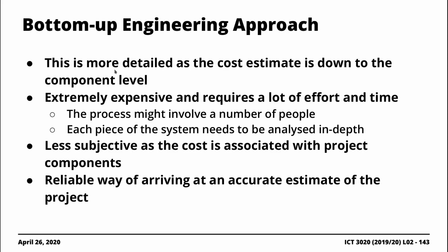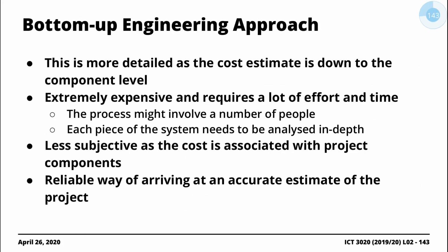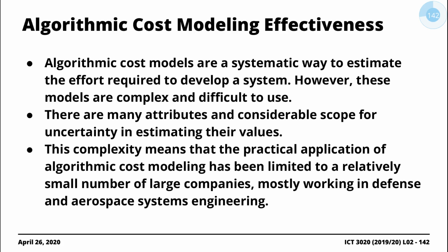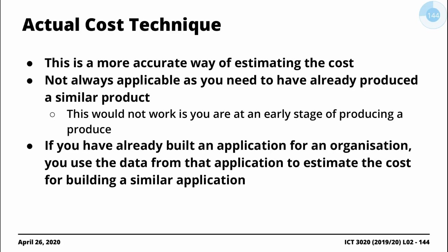But compared with the experience-based method, you notice that this bottom-up engineering approach is similar to the statistical approach or the parametric approach in that it's less subjective, right? Because it's less subjective, you are more likely to arrive at a cost that is much, much closer to the actual cost. So this in fact is similar to this. It's a much more reliable way of arriving at an accurate estimate of the project.